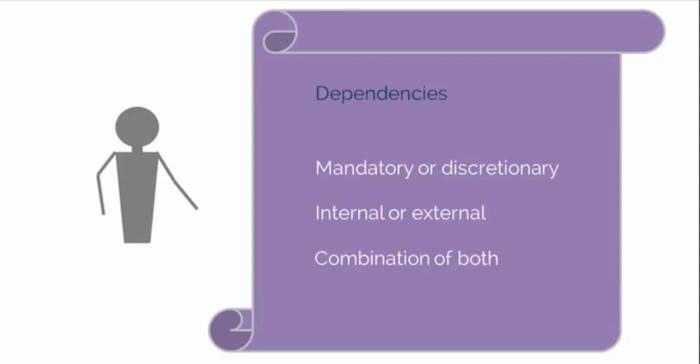External dependencies involve a relationship between project activities and non-project activities. These dependencies are usually outside the project team's control, unlike internal dependencies. For example, you need to ensure that the electrical company has connected the electrical supply before the cables can be